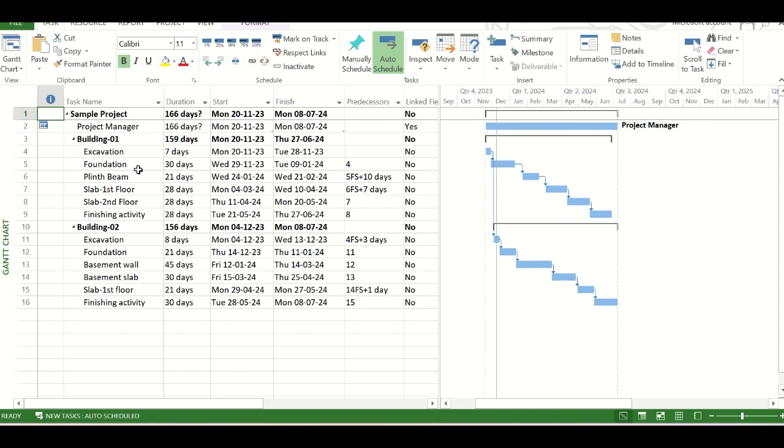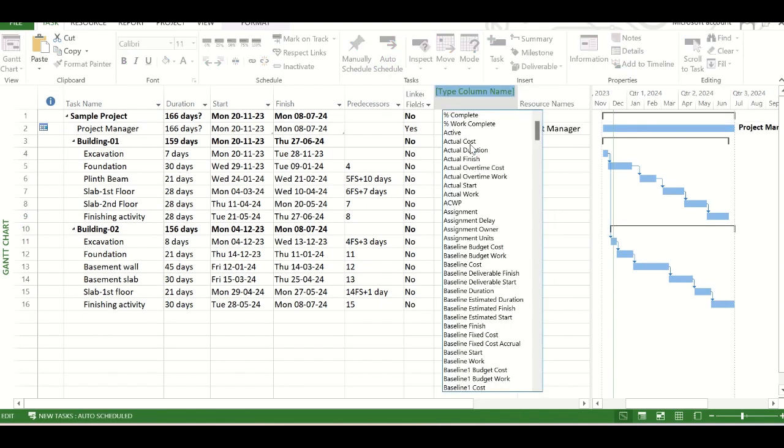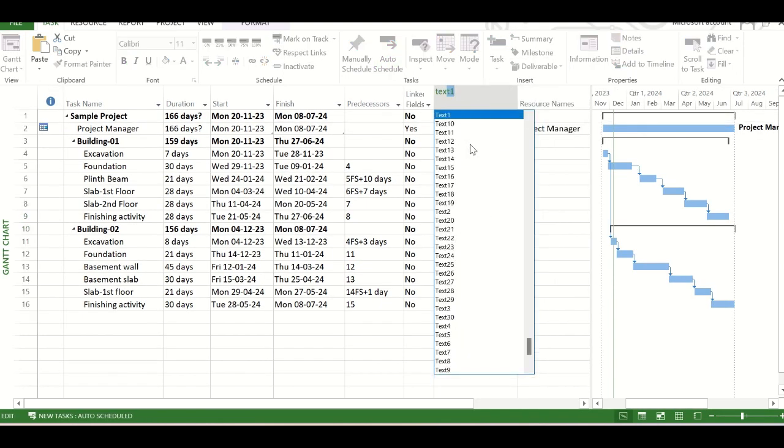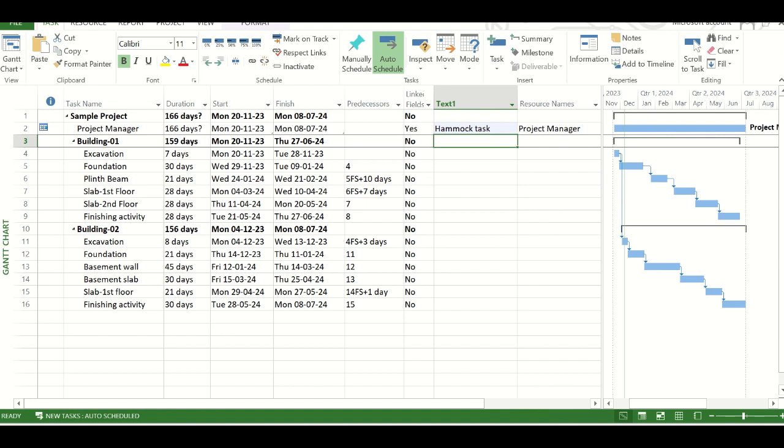One very important thing, if you are preparing the schedule and giving it to someone, then any person who is new to that schedule may be confused with a hammock task if he has no earlier information on it. So it is a good practice to have a column of text and mention that it is a hammock task. So I think with this you have now got a clear conception about implementation of a hammock task.